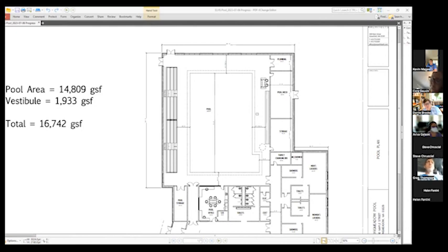Yeah. And I think what we can do is prepare written packages of the options as well, and what all the consequences of some of these are, so that we have essentially the narratives, while forming the 3-dimensional basis of the primary option. So perhaps if it's really clear on the 1st which options, if any, we're taking forward, then we have the material to go to the cost estimators, because we're trying to keep this all aligned in time with the high school project, so that the community can review it, and we get the information out to the community.